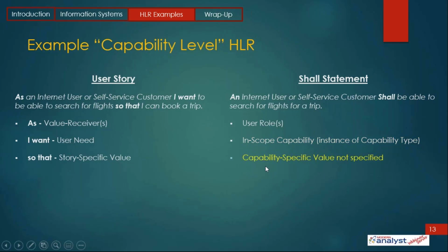What about value? We didn't mention the value. Okay, the reason is we're in a project, okay? We don't have to specify the value at the requirement level because we have a value of the overall project. It's got a budget, that sort of thing. So any activity that's in scope is supporting that value.